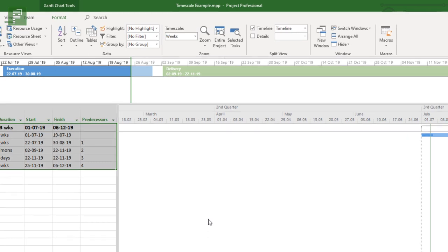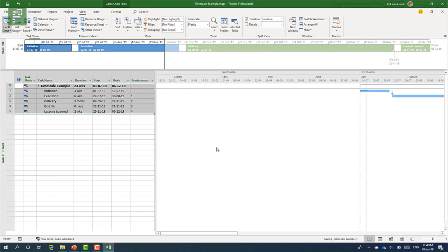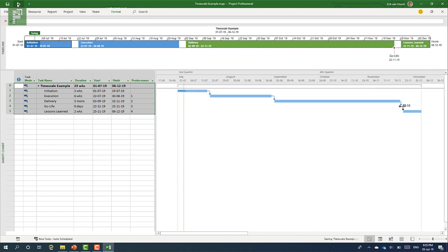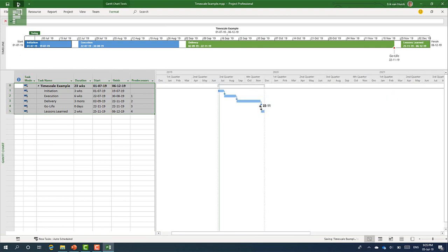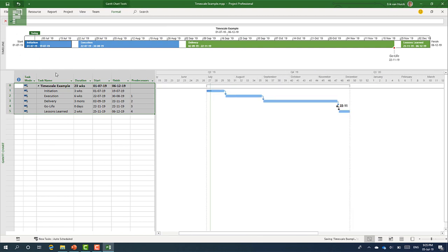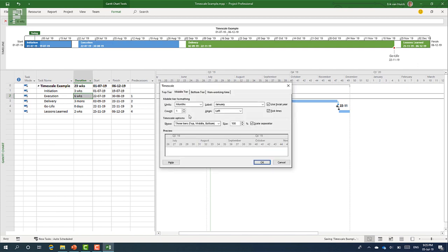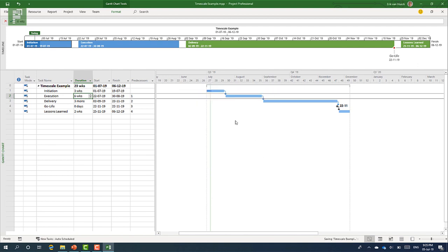The way to work around this is actually to save the view the way that you wanted to have it for later purposes and make sure that no one changes that view afterwards. So let's do that right now. I'll click on undo a couple of times and hope that I can revert to my original view of the timescale. Here we go. So this timescale is actually like I like it.